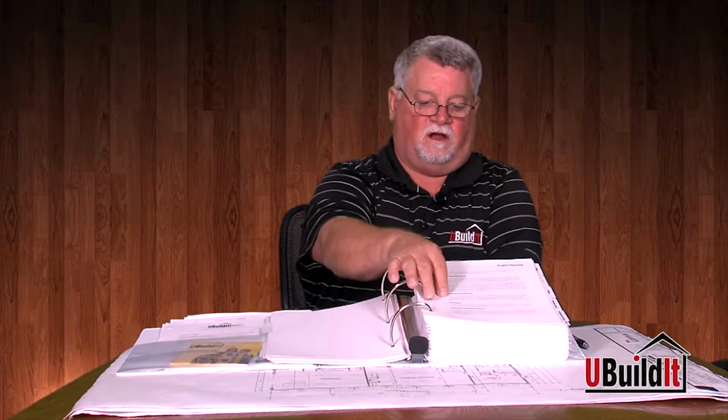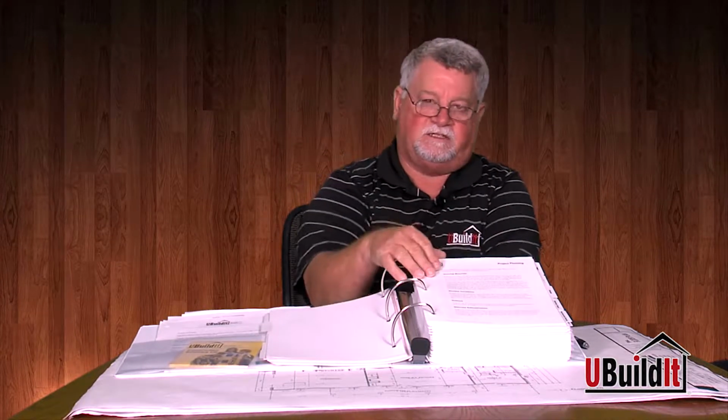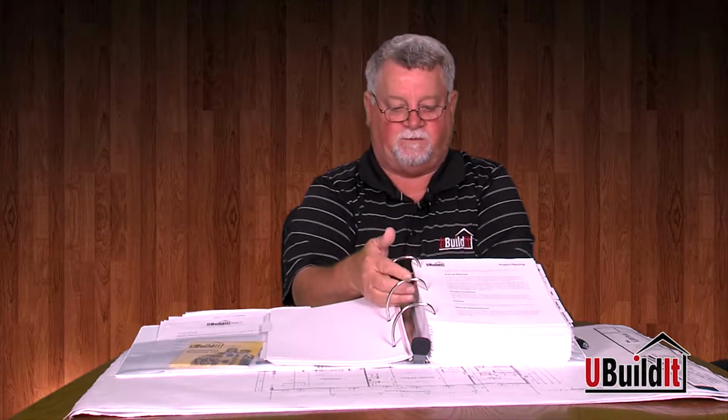Weather conditions. Obviously, subcontractors aren't going to work in adverse weather conditions. If it's freezing outside, they can't pour concrete, they can't lay brick, they can't do stuff outside. They will not deliver materials when it's raining, normally roofing materials or sheetrock, anything like that. Trim material. Holidays, working on holidays. Subcontractors won't work on holidays normally, Christmas, Thanksgiving, New Year's, things like that. So these are basically setting expectations early and knowing what to expect.